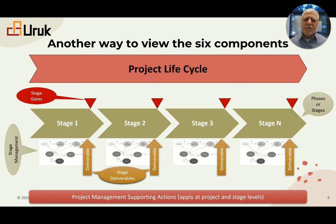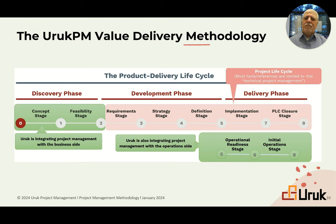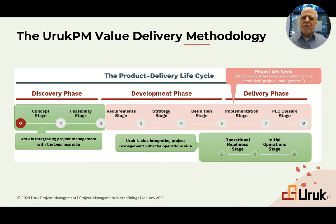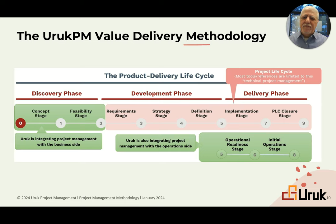After project completion, we perform a success assessment — sometime in the future, days, weeks, months, or even years later — to assess whether the project delivered on its business case. Only after that final assessment do we consider the project closed, moving it from the completed list to the closed list. So the project lifecycle goes: future, active, completed, then closed.